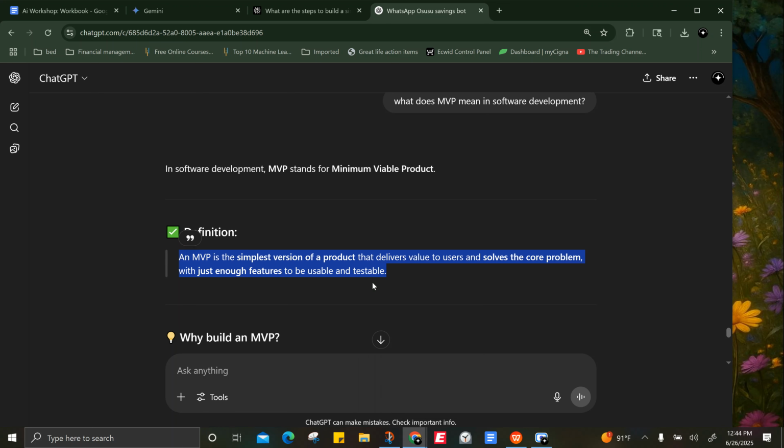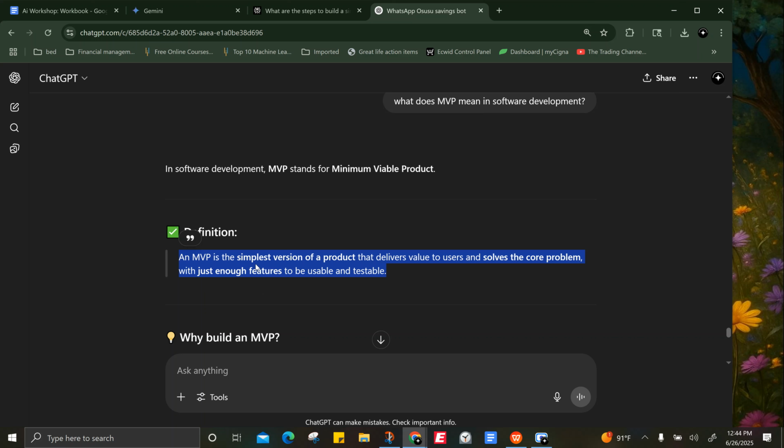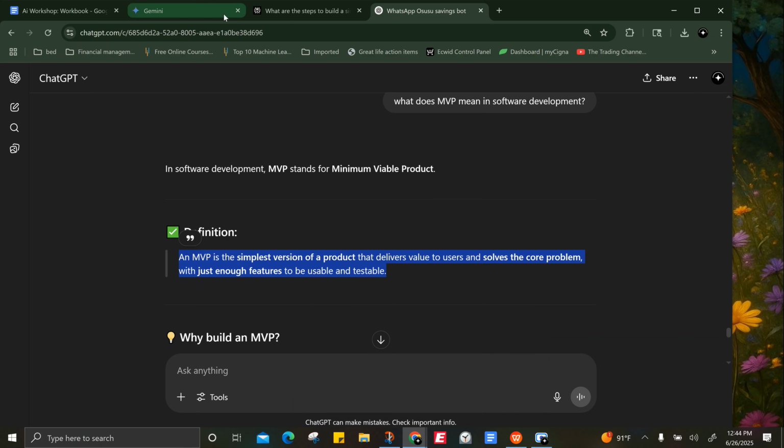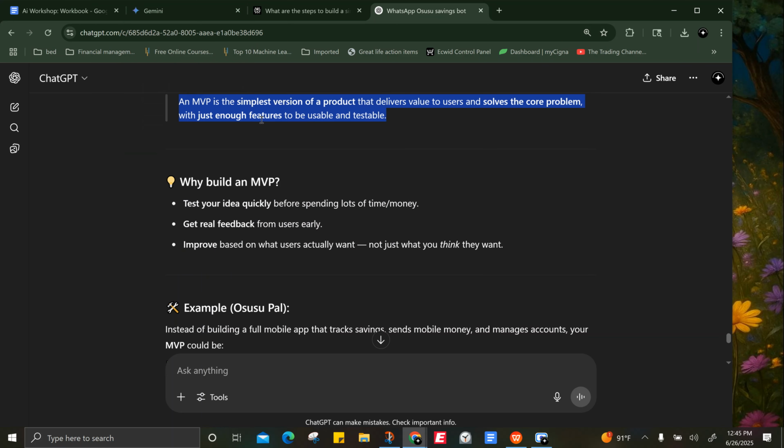But this is our first initial one for the class. It's not MVP, or to be able to post to share on social media. If it could do that, great, but it's not MVP. The simplest one right now is for somebody to track their contributions. Yeah, track contributions. That's the MVP thing right there. If that can happen, that's what matters. Everything else can be added later.